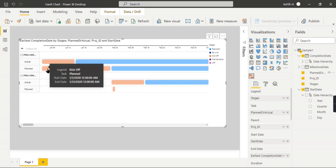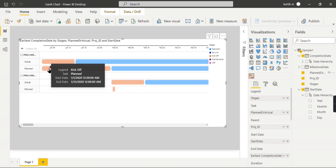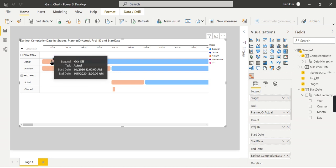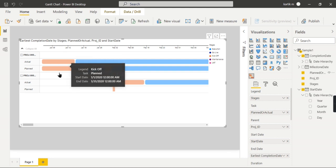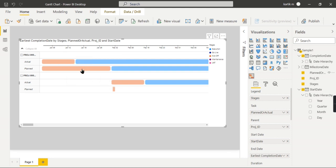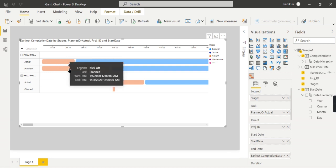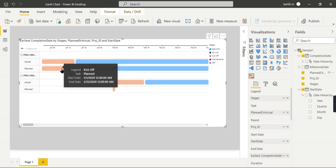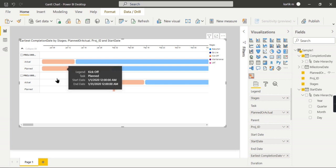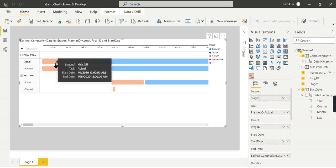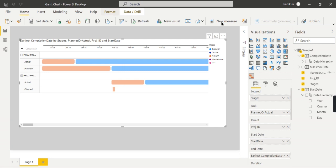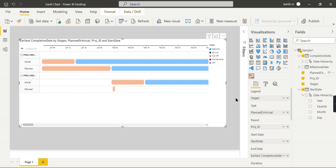There you go. Now you can see for this project 05, the planned start date is from January the first and end date is 31st of January. Your kickoff date for actual ended on January the 15th. From this view you can quickly see the actual is completed earlier. This is what you can easily track—your projects based on the planned and actual activities for this Gantt chart.